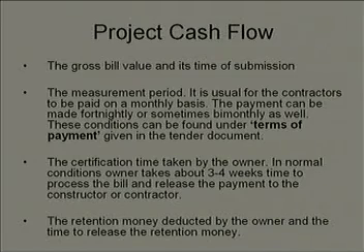This information is derived from the construction schedule that the contractor has prepared and that has been approved by the owner or the client, right.